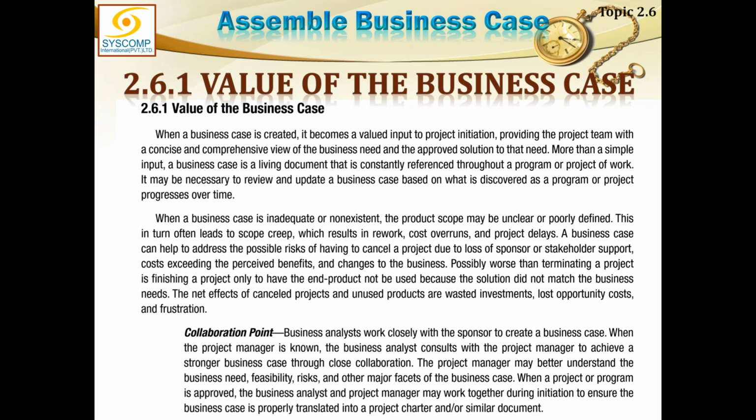A business case is a living document that is constantly referenced throughout a project or a program. It may be necessary to review and update a business case based on what is discovered as a program or a project progresses over time. Maybe the business case changes because the business case is tied to the organizational strategy and the business need. So what if the organization changes its strategy or the business need is changed? So the business case will have to be revised, no matter if the project and program is now running. Even then, if the business case changes, we have to change the way the project or the program is running, or maybe sometimes we have to close it down. That project may not be important anymore.